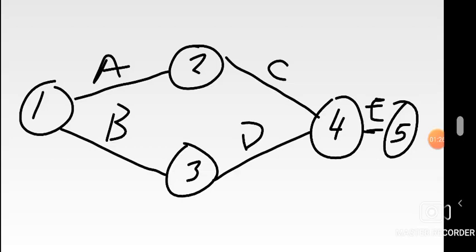One thing we're going to include on this diagram, which was forgotten in CPM 1, is that part where there should have been a dummy here. A dummy is just a dotted line which we include on the diagram. Someone would ask, why include the dummy now? Well, if you go back to the CPM 1 video, there was that part which said A precedes C and D, meaning C and D should not come before A. The one clearly shown was C, because we know that C branched off where A was ending.